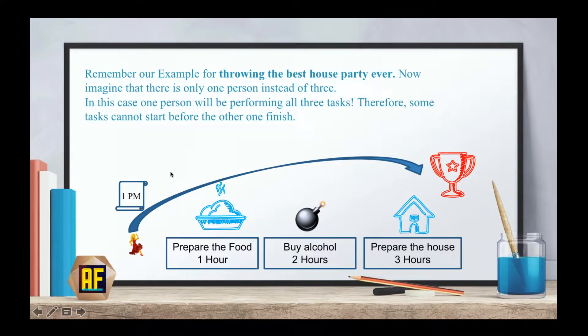In this case, one person would be performing all three tasks. Therefore, some tasks cannot start before the other one finishes. For example, when you go to buy alcohol, you cannot prepare the house at the same time because you're not in the house.